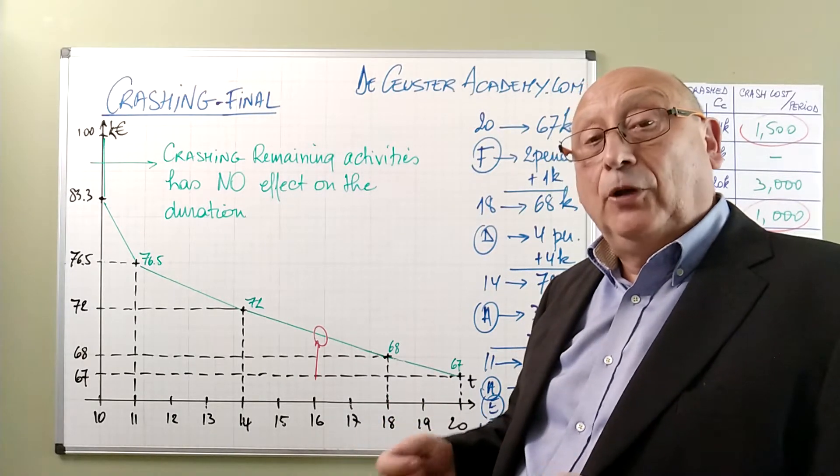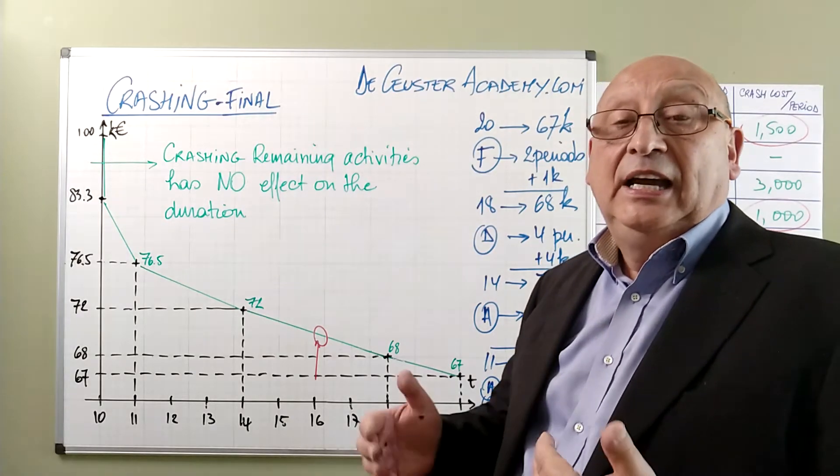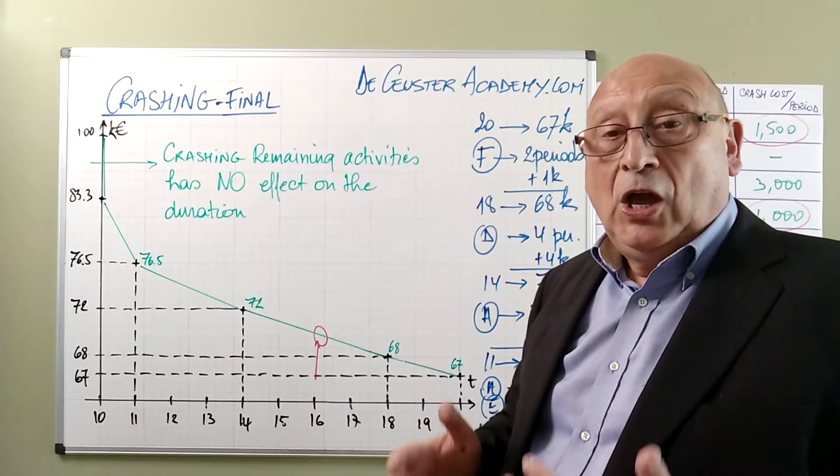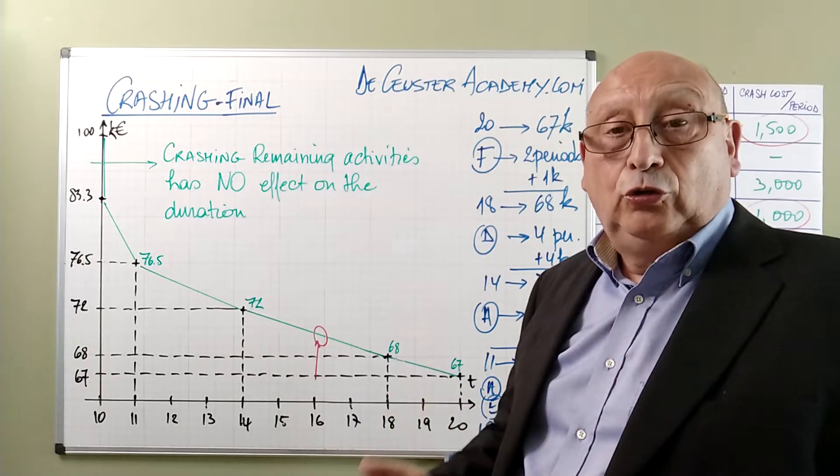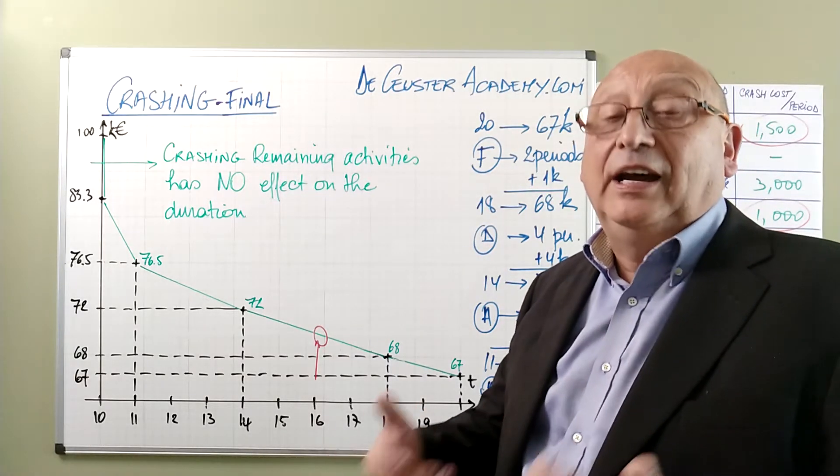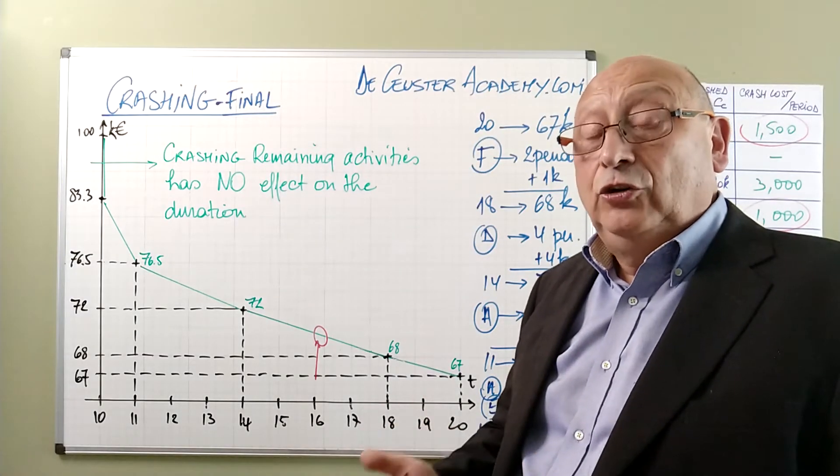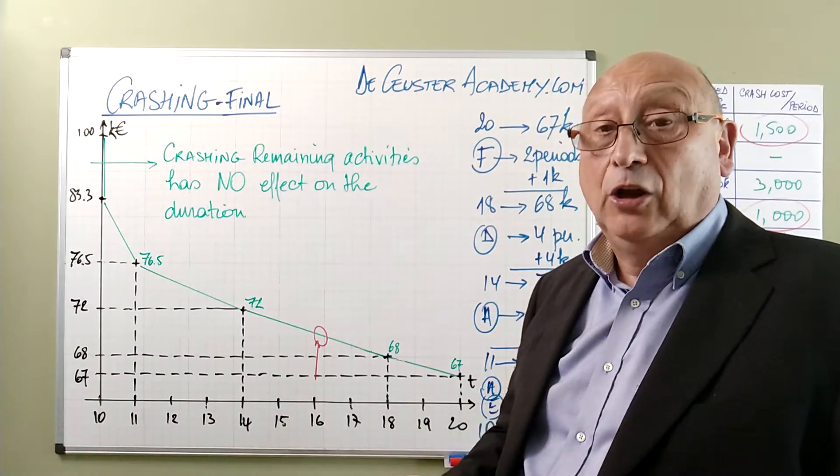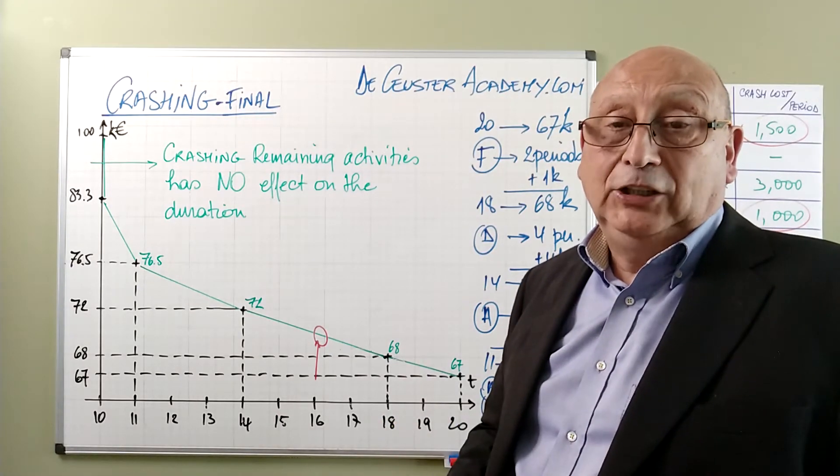In that case, we will keep on crashing as long as the total cost of the project reduces. The same thing with the rewards: is it worthwhile to crash? We have to see what's the effect of the rewards, the additional money we get. In fact, it means that the cost of the project for us will be lower, and the effect on the project management team.